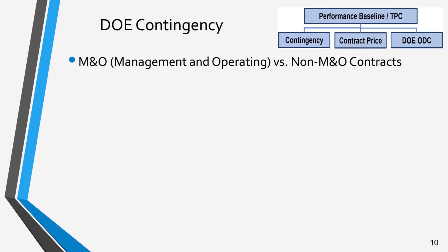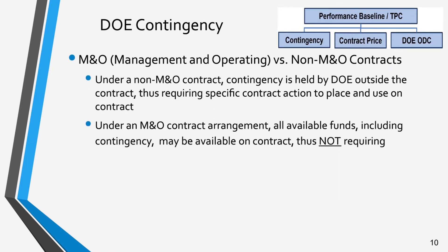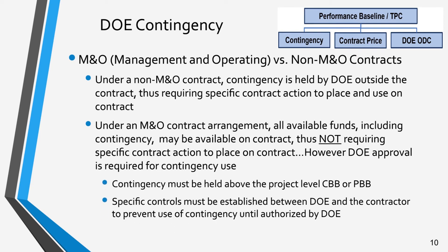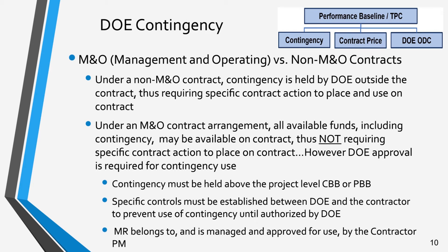The requirements of MR, contingency, budget, and funds must be consistently established and followed. The process is very similar whether the project is executed under either an MNO or non-MNO contract, even though significant differences may exist in contract funding mechanisms between MNO and non-MNO contracts. For example, while under a non-MNO contract, contingency is held by DOE outside the contract and specific contract action must be taken to place and use contingency on contract.